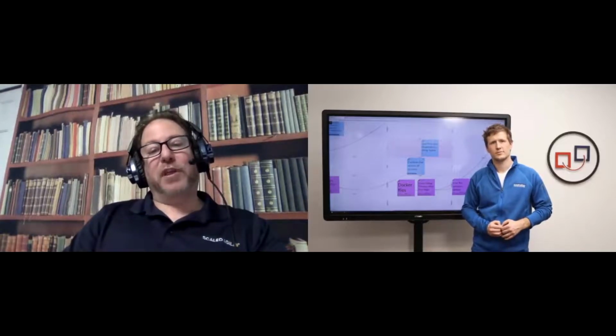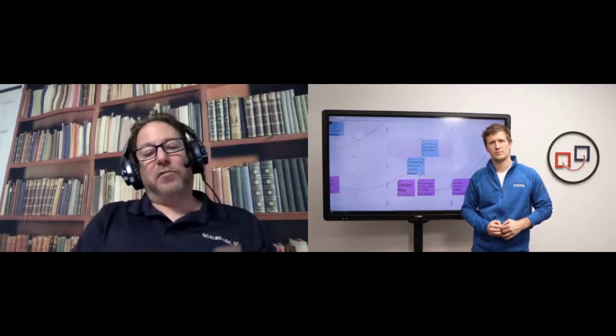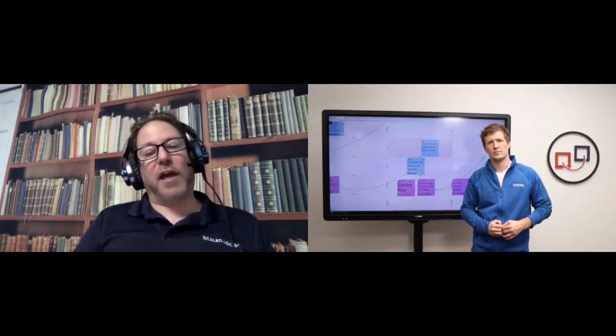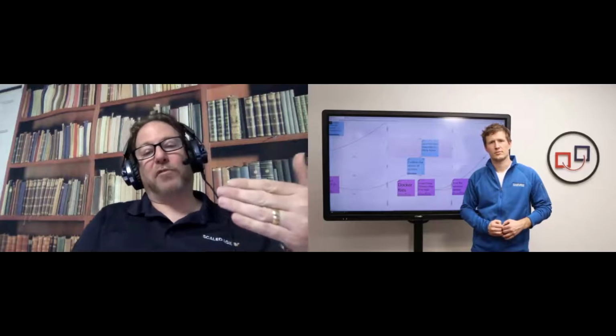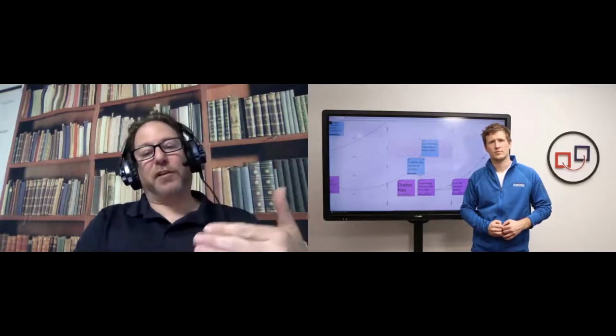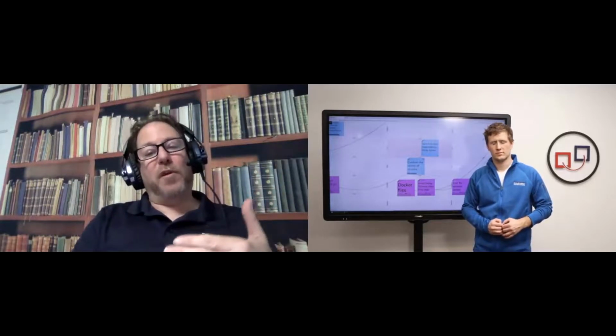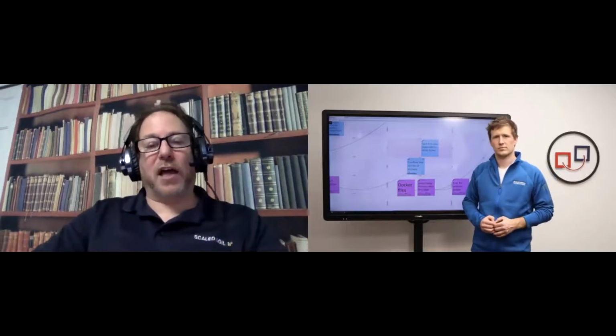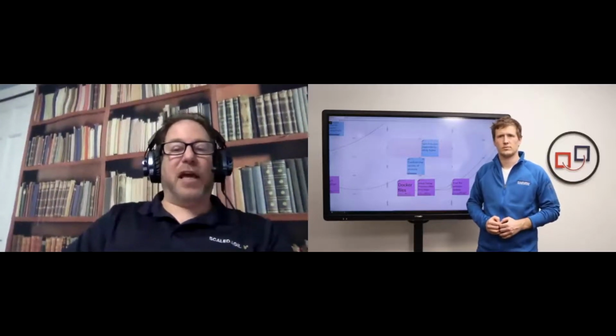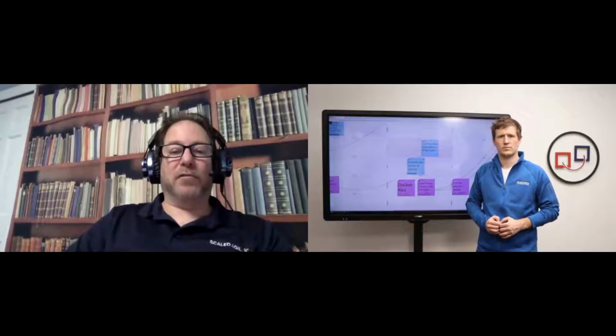We really want the teams to be collaborative. If a team has to do a feature and they need to create an API, we don't want the team that's creating the feature to wait until the team that's developing the API to be done. We want to collaborate on that together. So when that API work starts, we should start on the feature work at the same time. So we're doing things in a different way. It's not a bunch of handoffs and delays like we did in Waterfall.